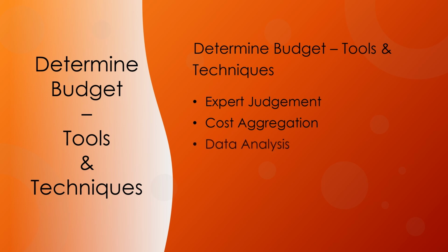Data analysis is a major aspect of budget determination. The project manager will engage in several techniques to analyze project data. For instance, reserve analysis, which can establish the management reserves for the project. Management reserves are an amount of the project budget withheld for management control purposes and are reserved for unforeseen work that is within the scope of the project.